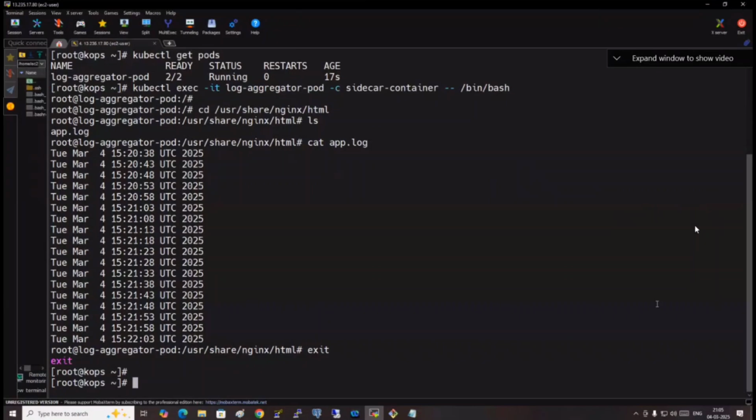Not get the projects. Projects will be leads. We get it from the CFO, the Chief Financial Officer, right? That guy will go and get the projects. He will get the client, but he doesn't know technical things. He is from the business point of view. So he will get the client, and then we will be sitting there, myself and the technical principal architects, not solution architects, not senior level architects. We'll gather the requirements of the customer. We'll talk to the customer, find the requirements, and then we will create something called RFPs, request for proposal. RFP, what's that? Request for proposal. So whatever requirements we get, we'll analyze that, and I'll explain it to the principal architect, and then he and I need to design that RFP.